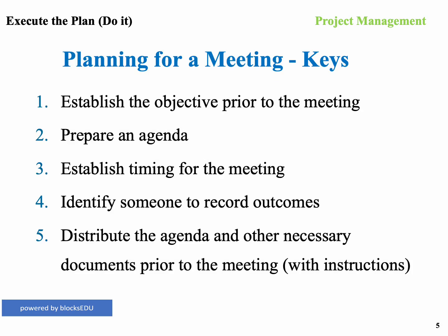Planning for the meeting, some keys to this. Establish the objective prior to the meeting. Make sure that when you have a meeting, everyone, yourself included, knows what the objective of the meeting is. Why are people there? What are you trying to achieve? Prepare an agenda in advance. Establish timing for the meeting. Identify someone to record outcomes, not a minute taker, not to rehash or record every conversation that's going on, but outcomes of the meeting.